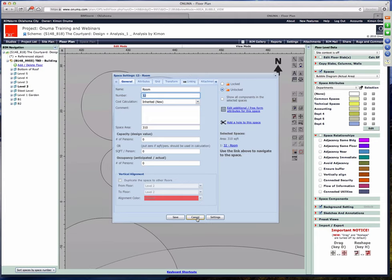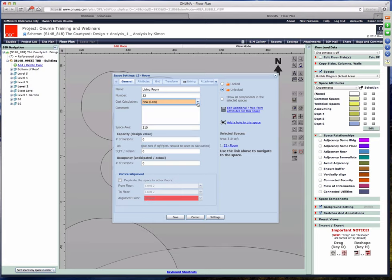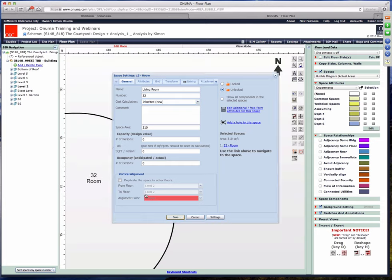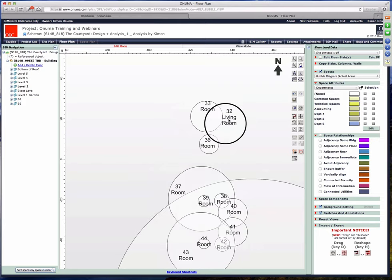One thing I would recommend is actually starting to classify these spaces in some way. If I click on this, the name is just 'room' and the number is 32. I'm going to randomly start assigning room names — let's call this a living room, for example. One interesting thing is that before you go into detailed Uniformat cost estimating, there's a way to start assigning whether this is a high, low, or medium cost item. If you're designing a hospital, an operating room would be high and a waiting room might be low. You can start assigning numbers, which starts generating cost estimates at that level of detail before accounting for individual elements.